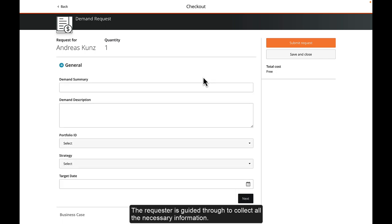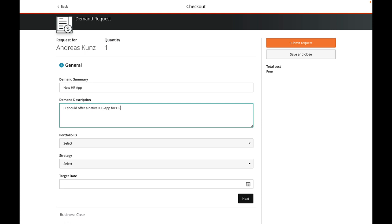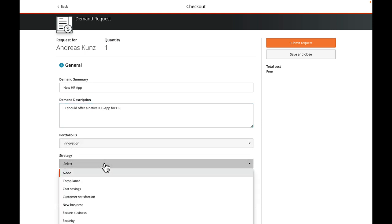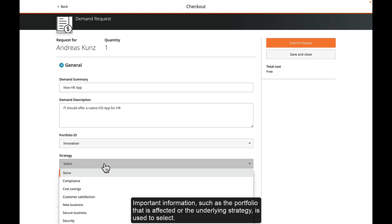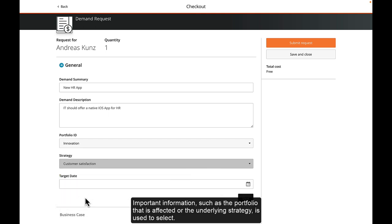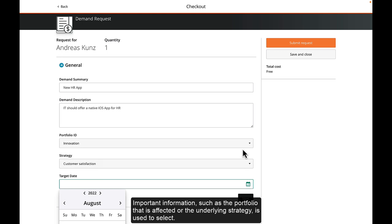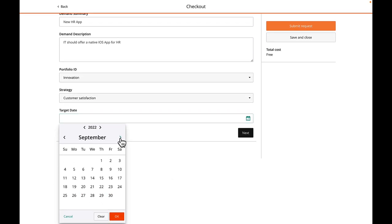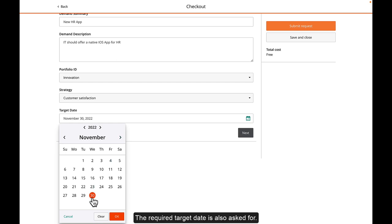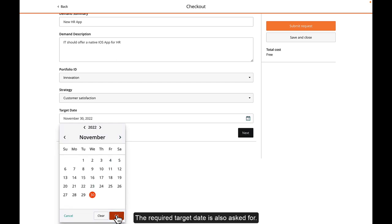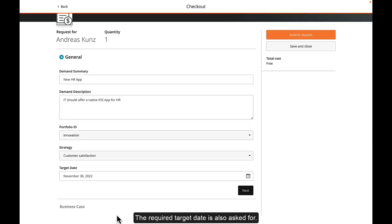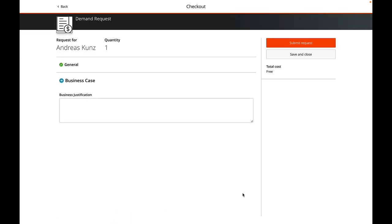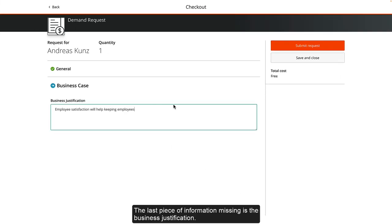The requester is guided through to collect all the necessary information. Important information such as the portfolio that is affected or the underlying strategy is used to select. The required target date is also asked for. The last piece of information missing is the business justification.